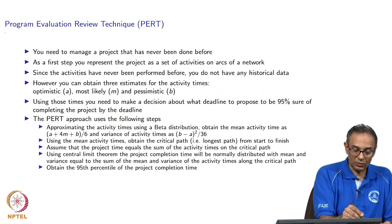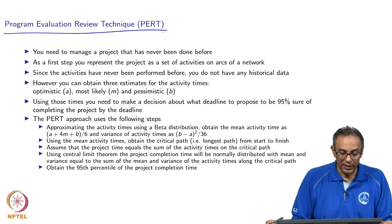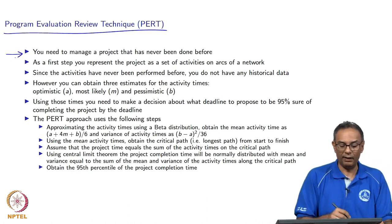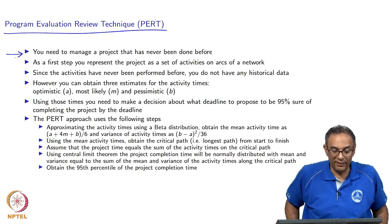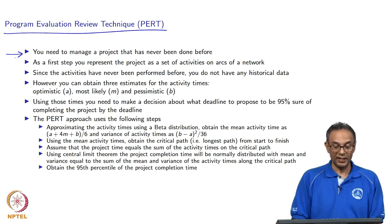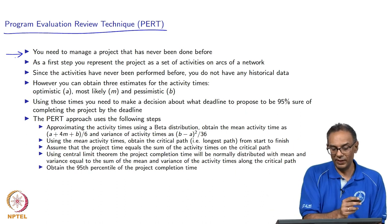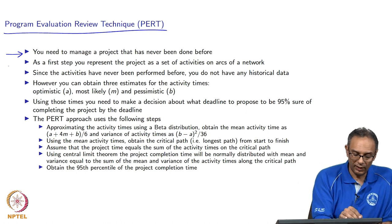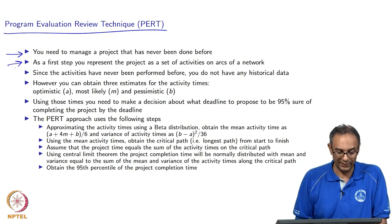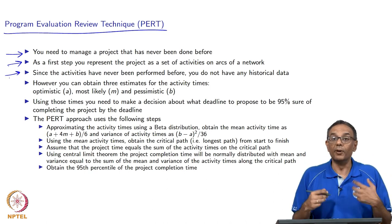This type of problem falls under what is called PERT — Program Evaluation Review Technique. PERT is used when you need to manage a project that has never been done before. This is a very important aspect of PERT: you do not have tons of prior data. Each activity has never been done before, at least not by the people pursuing them. So we think about putting this project down in a formal network to analyze it.